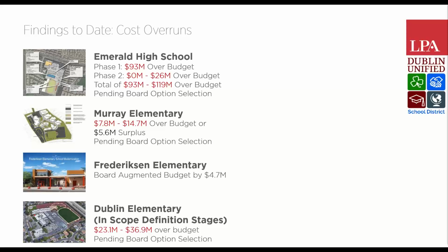So if you're 2 years late on a project, that could be an extra 6 or an extra 10 to 12% on costs with the escalation that we're seeing right now year over year. Some of them were simply prices just have gone up faster than we could keep up with estimating.